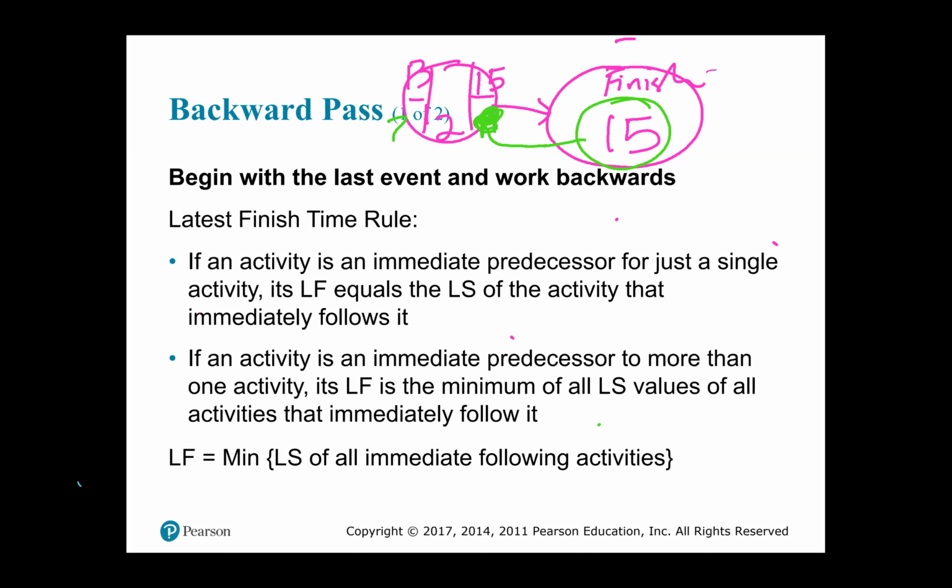So you take the 15 from the finish, you follow the forward arrows in a backward way, and you plunk it down in the late finish spot.